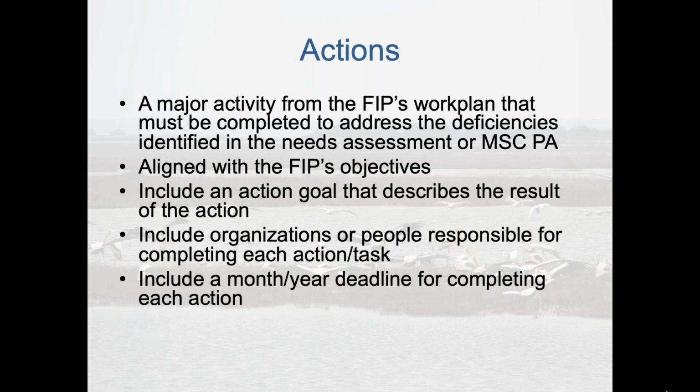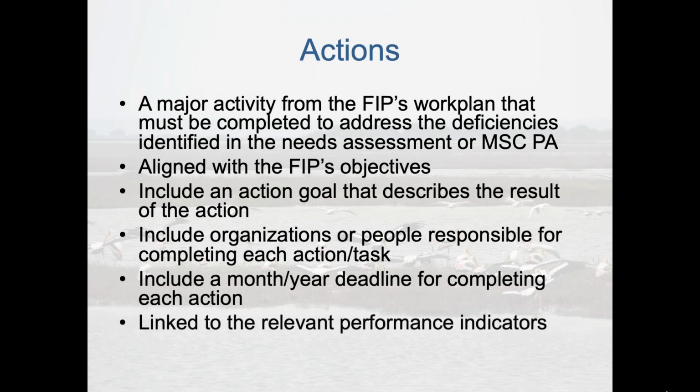They should also include a month and year deadline for completing the action. So a lot of these are very similar to the objectives that need to be in place for the FIP as well. And very importantly, the actions need to be linked to the relevant performance indicators.